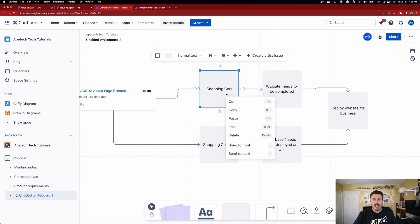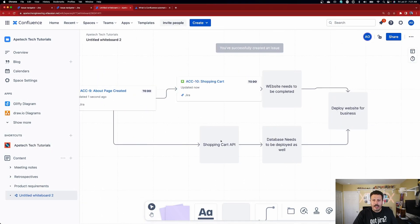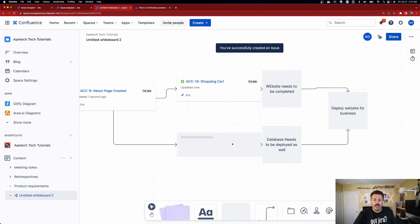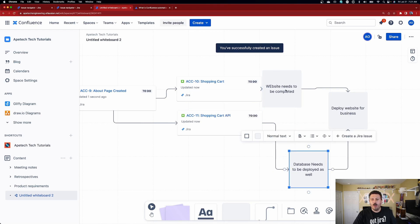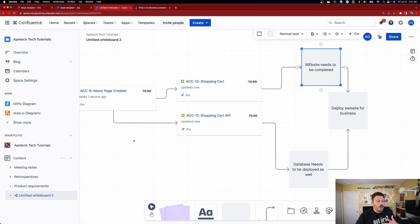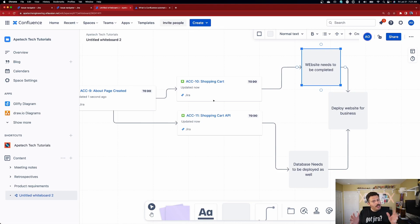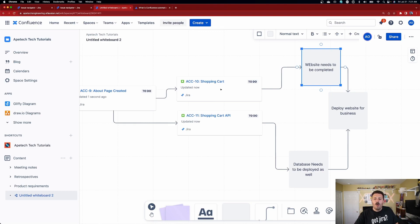If you just rely on Jira, yeah, you have your things ranked, but you can't really articulate in a very visual way — make sure you do this one, then this one, but these three can go together. That's kind of hard in Jira. But over here inside of Confluence, I can stack these together so my team can understand they can work on these at the exact same time, and then move on to the next ones. Your team can now fully appreciate what can we work in parallel, what needs to be in series — and it makes communication of expectations so much simpler.